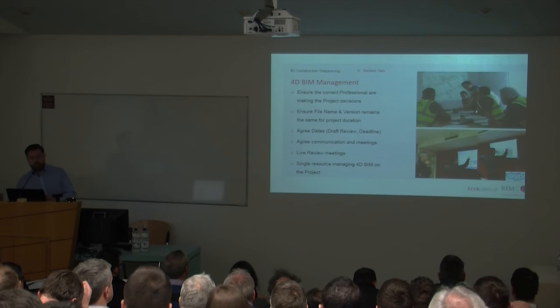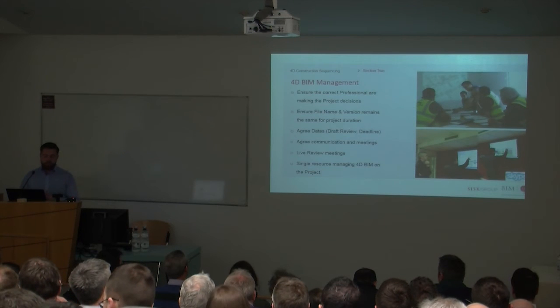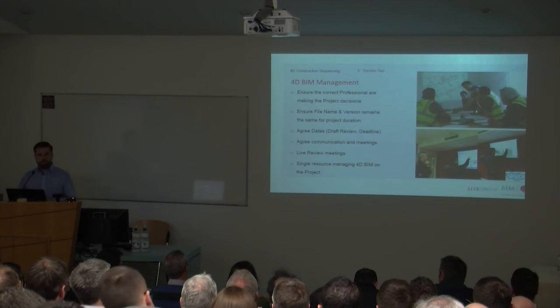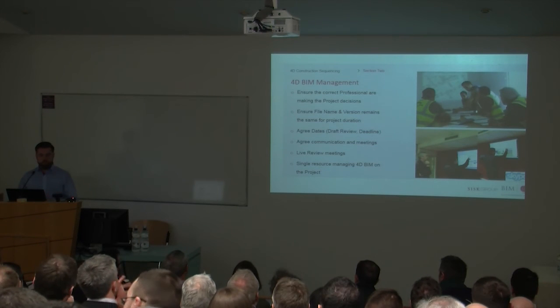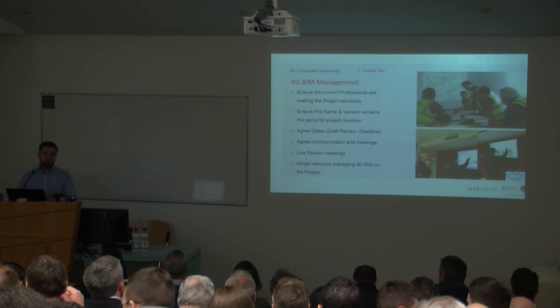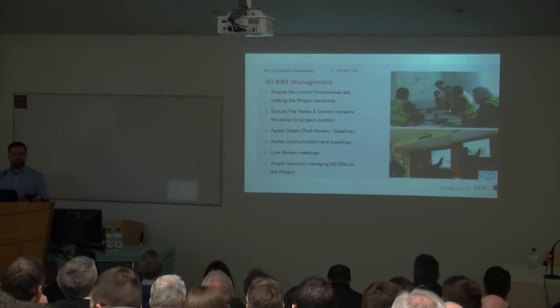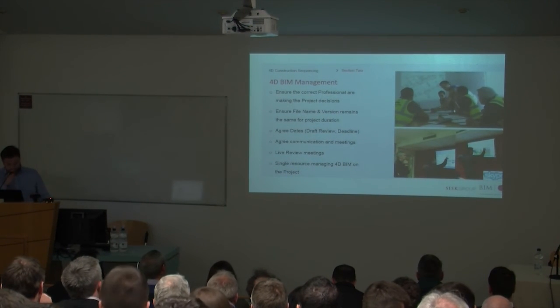So agree communication and meetings. If it was a 6-week turnaround, you'd have a review meeting after the first 2 weeks. You'd review and see where your model is. Do you have your site set up, compound, logistics, all of that developed at this stage? Is your construction program nearly finished? Is your construction methodology? If you set these meetings so that they're productive, you come out of the meeting knowing that, right, in 2 days or 3 days time I have to have a review of the construction sequence.